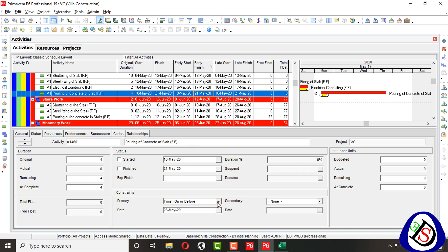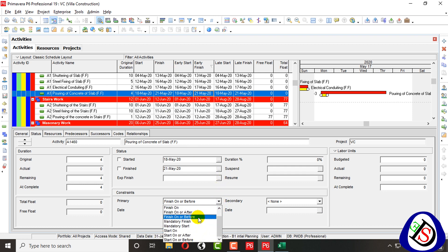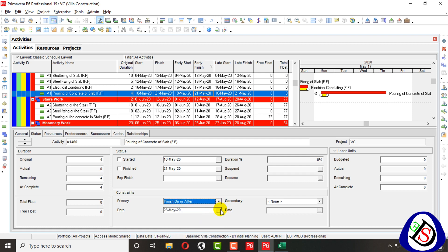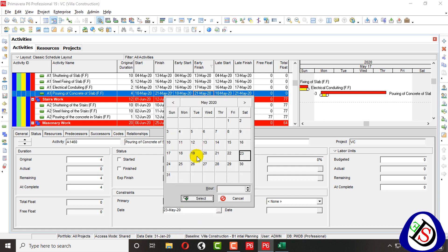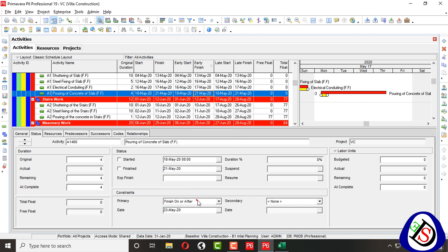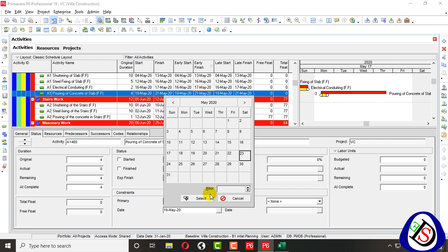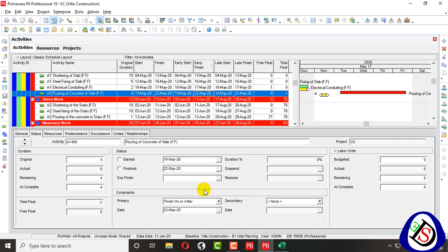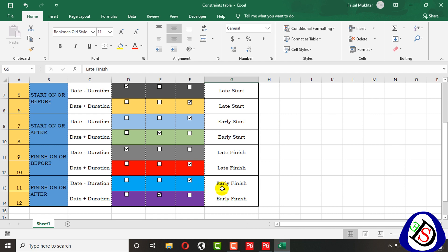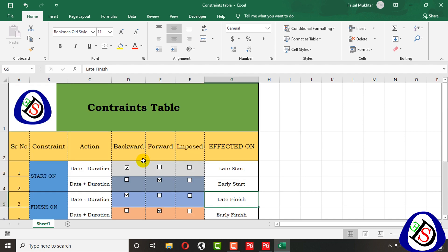The next constraint is Finish On or After. When I deduct two days to 19 May and schedule it, you can see no effect — the imposed date remains the same. When I plus two days to 23 May and schedule it, Early Finish date is affected. You can see Early Finish is the imposed date; Late Finish imposed date remains the same as imposed.